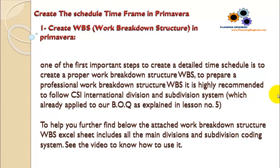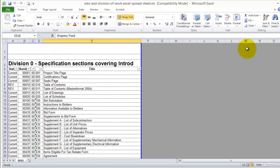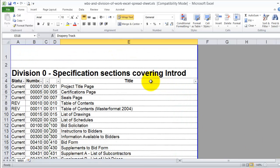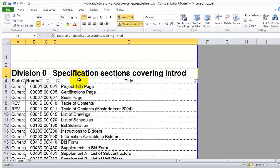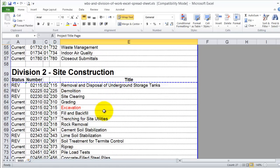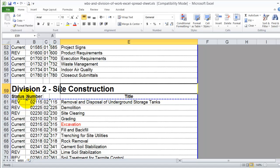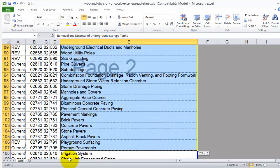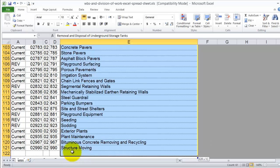If your Bill of Quantity is not already divided by the CSI international division and subdivision system, this is the Excel file you can download from the provided link. You will find that it is divided into divisions and subdivisions. For example, division zero is the specification section, which can be divided into all its subdivisions. For something common like site construction, you can break down your activities into all of these subdivisions, giving you a very good understanding of how to break down each division of work.